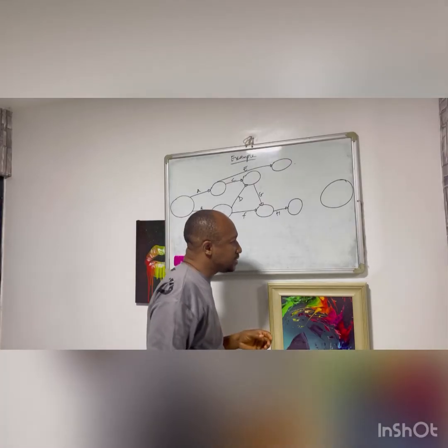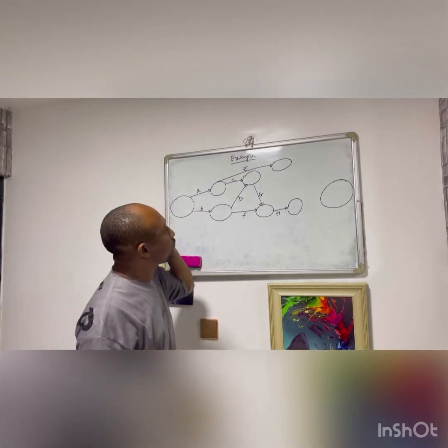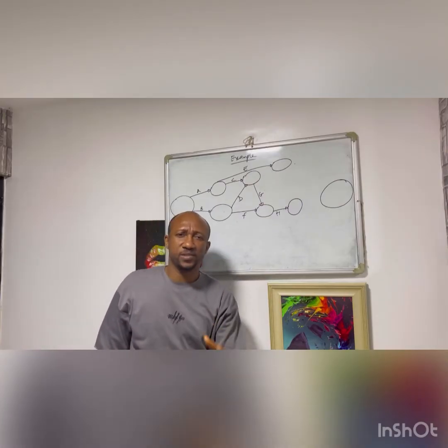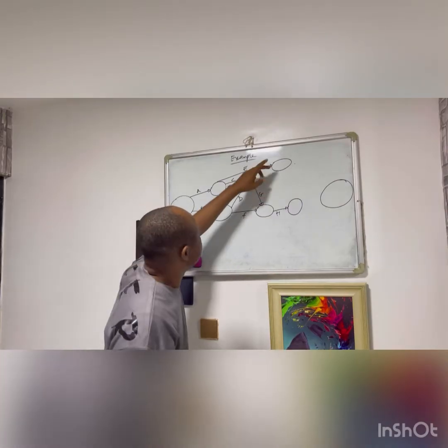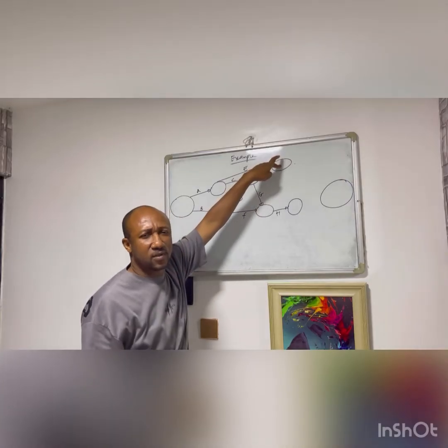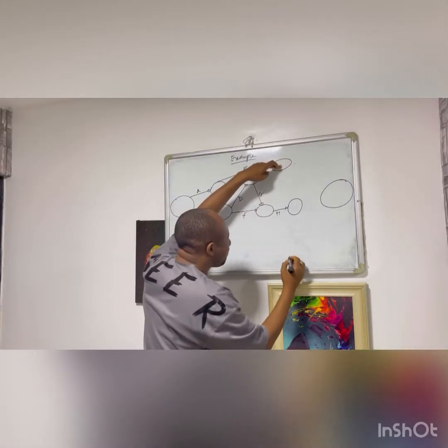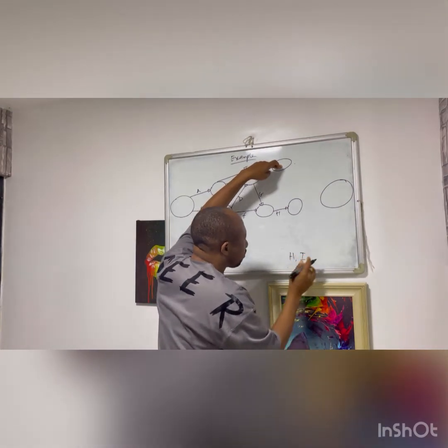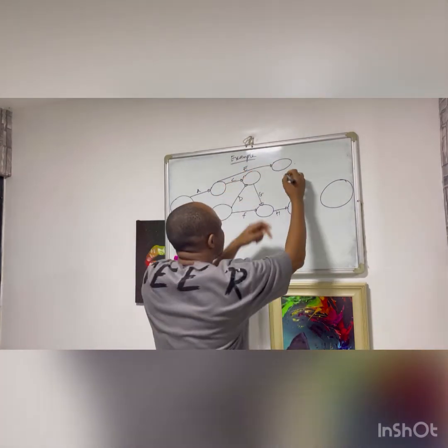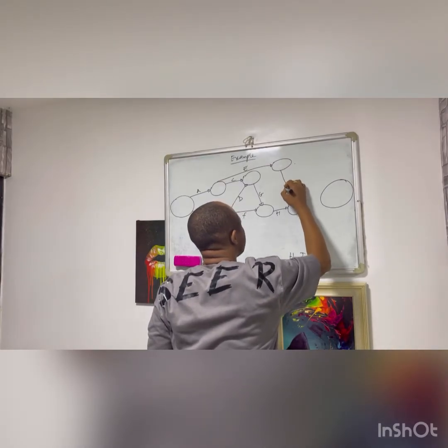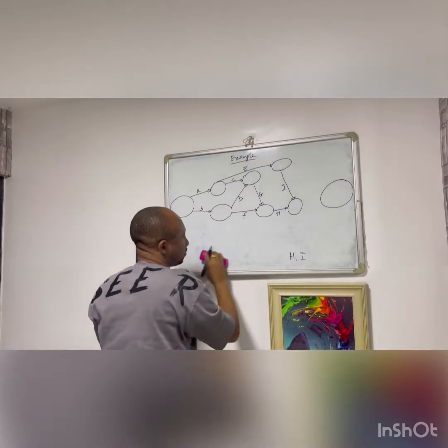Then activity I will commence from where activity E ended, because activity E is the preceding activity for activity I. This is where activity E ended. So activity I will commence from here, and then activity I will finish where H is, because activity I and H are standing together. So activity I will come in that direction.